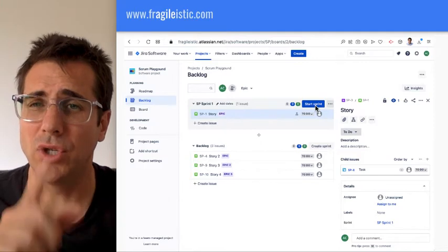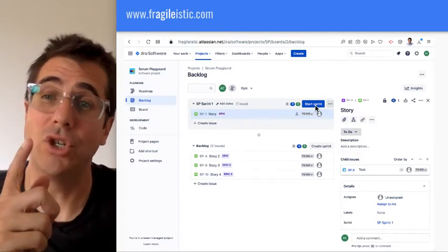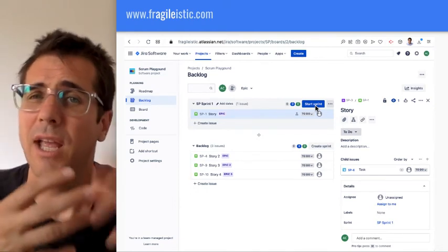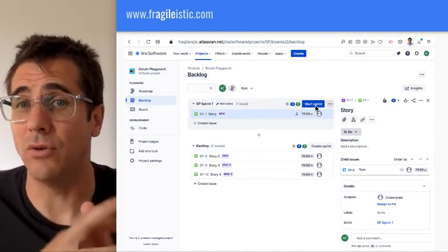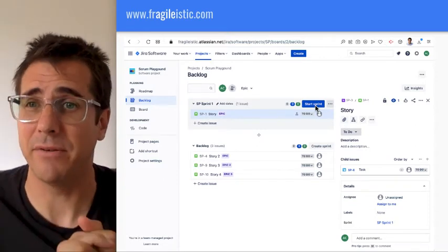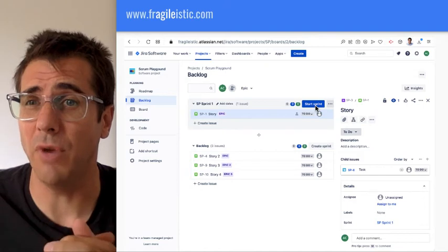Now this is a difference between the two systems. In Jira, you start the sprint and you end the sprint. In Azure Boards, you set up all your sprints as a set cadence for the foreseeable future, and they're set, and it will just start and end automatically. In Jira, you start them and finish them, and start them and finish them. You don't really map out your sprints, which is a bit unusual for me because you do know when your sprints are going to be.